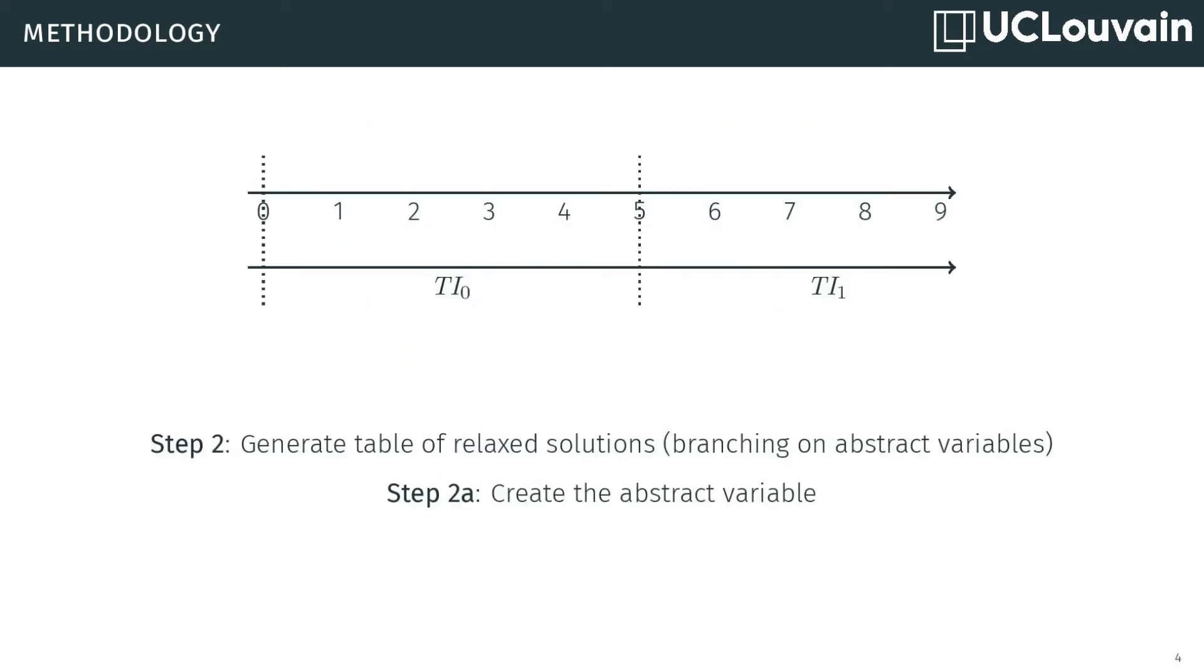The second step is twofold. The first part consists of creating our abstract variables. The idea behind is to have a more zoom out view of the problem by reducing the granularity of time. Instead of considering a time step of one hour, the time step could be one day or one week. In our example, we divided the 9 time intervals into two bigger time intervals. By adding these variables, the start of the task will now be scheduled during one of those time intervals.